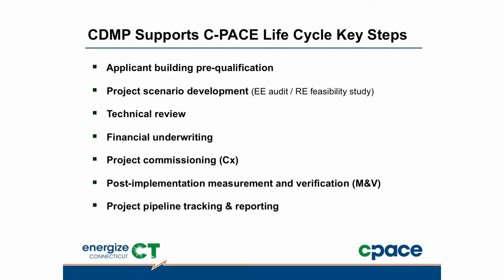Tom will speak to some of the commissioning checklist items that we'll be looking for. They also will be appended to your project file in the CDMP, so all the stakeholders have availability to that. And then the concept is that at the finance closing, on the basis of how complex the project is, the number of ECMs, and the interactive effects of those ECMs, the stakeholders will agree to an M&V plan, a measurement and verification plan.